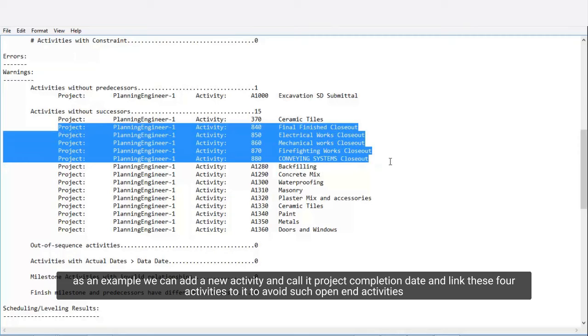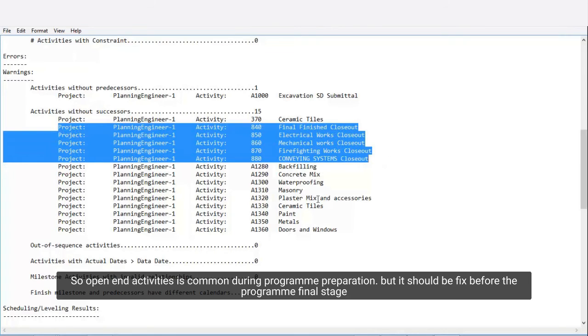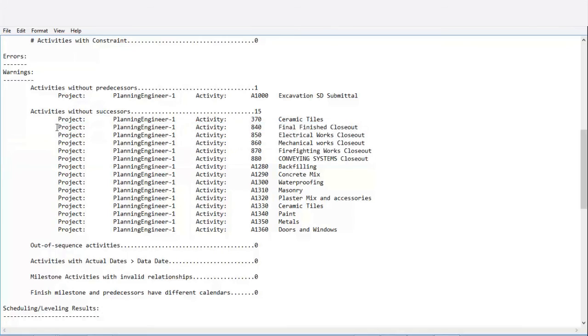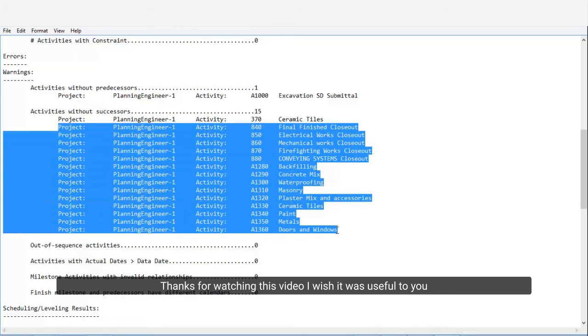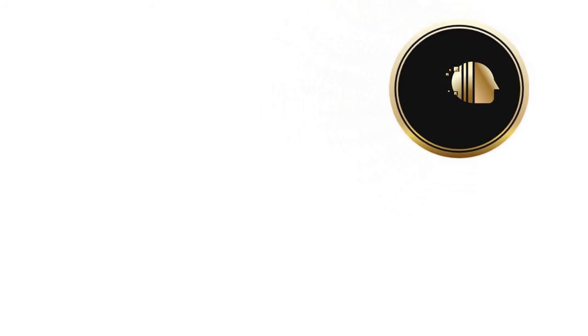Open-end activities are common during program preparation, but they should be fixed before the program final stage. Thanks for watching this video. I wish it was useful to you. See you soon, bye-bye.